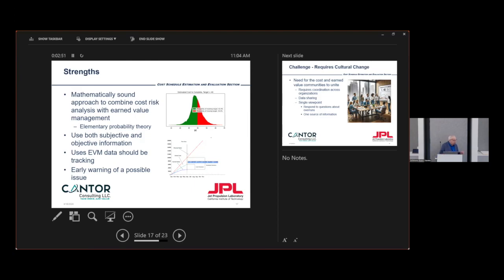The other thing we're doing is combining prior information or subjective information, because maybe the initial priors are just best case, worst case, expected case estimates from the subject matter experts who know stuff, and you want to take advantage of what they know as the initial priors, and we update that with the actual data.